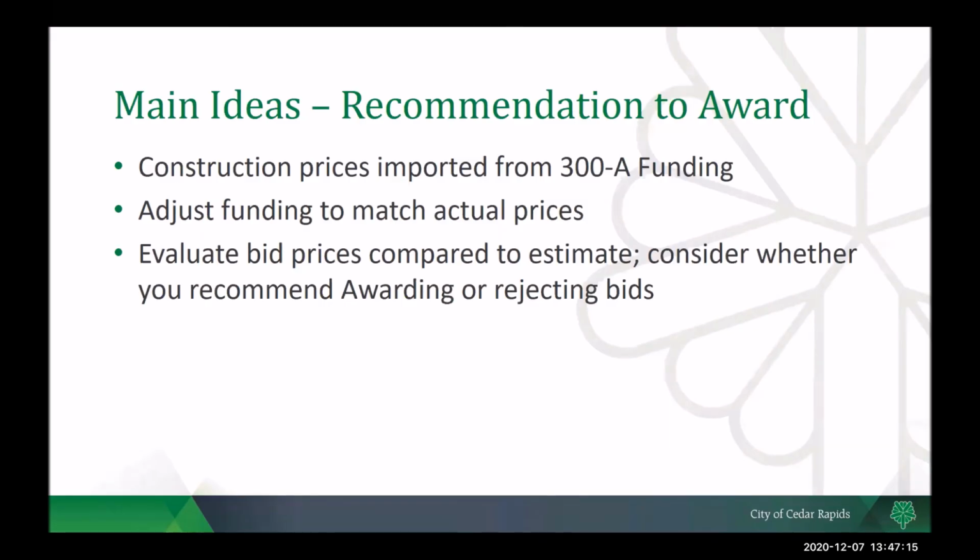If you have a surplus of revenue, great, you can decide on where to send that. If you are coming up short, more of a problem, you can see and work with your city project manager to see if there are different projects that you can pilfer money from, or you can cut into your construction contingency. But no matter what you do, revenue and expenses have to be the same at the end of the day, or you need to recommend to council that you not award the project or figure out some other solution.